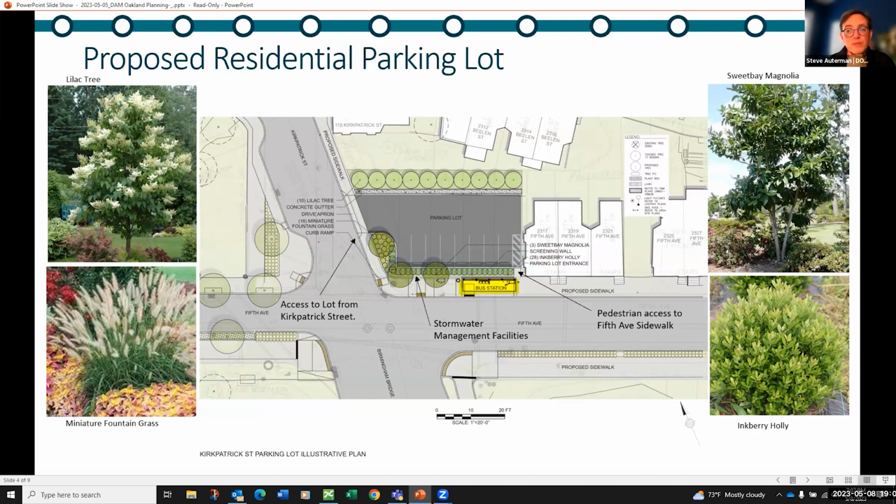The parking lot itself is only going to take about a month or six weeks from start to finish. It's not very complicated. There is the sidewalk reconstruction that will take place to rehab and replace the sidewalks. That will be the greatest disruption to pedestrians. We do have MPT plans that would show how to divert, because there's really not an opportunity to cross the street there and use an alternative detour. So we'll provide a diversion at that location.